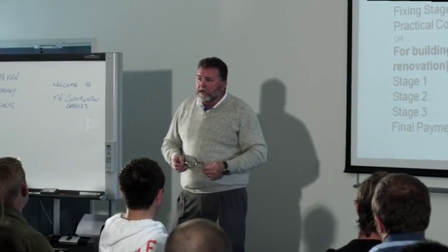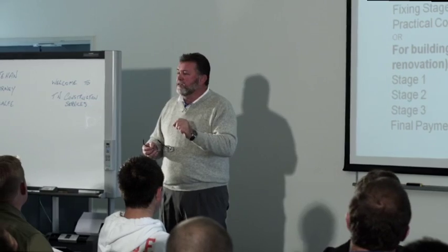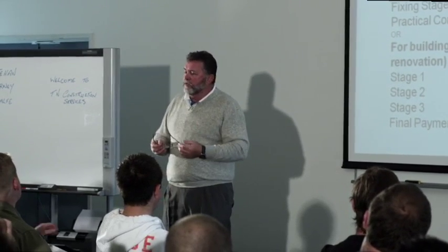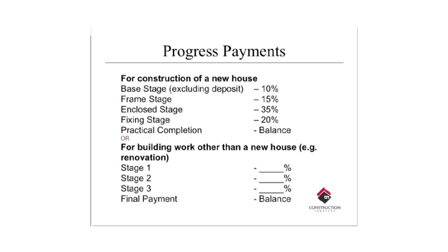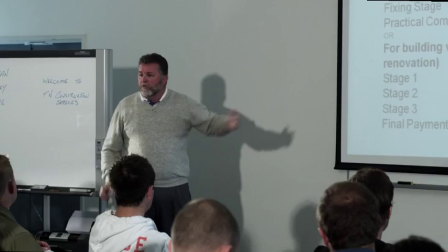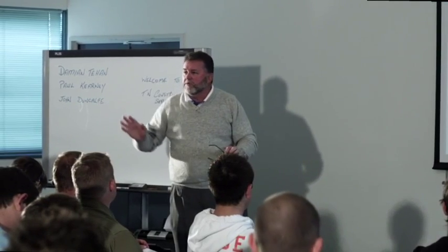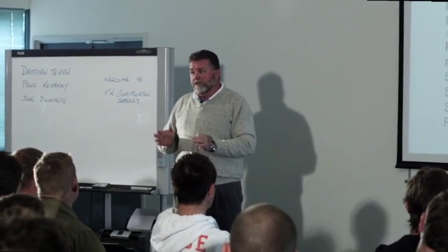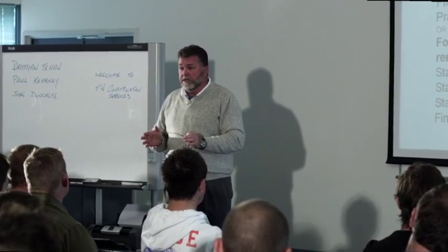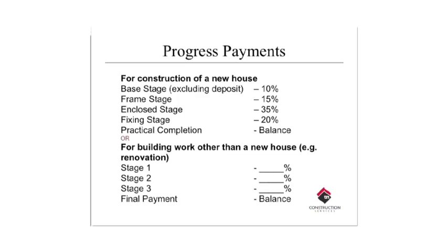However, having said that, if you now create your own payment definition, you need to define that. Because sometimes people come to me and they say, okay, we've got a lockup. Can anyone see lockup as a standard definition of what I've just said? What I mean as lockup, what this gentleman means as lockup, what you mean as lockup, can be completely different. So you've got to be very careful here, starting to create your own words of wisdom. And let me just say, I've seen some really great words of wisdom because it even has me confused. So these parts here, the base, the frame, the enclosed, and the fixing, are actually already defined in the contract.